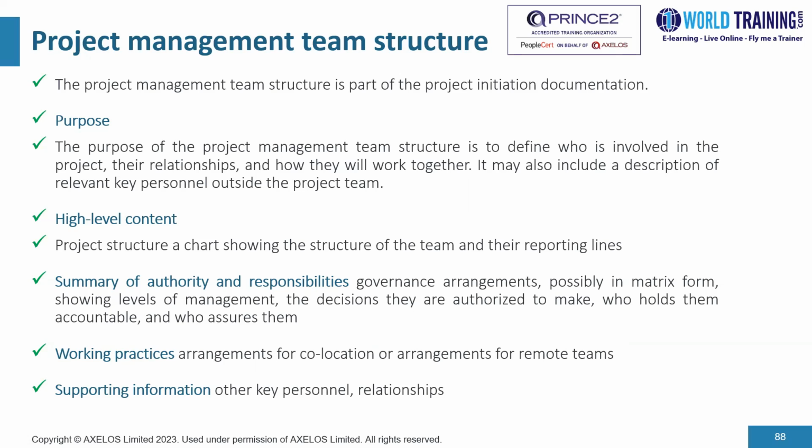So some of the content areas in this particular document would be the project structure, showing the various people involved and the reporting lines. It would include a summary of authorities and responsibilities, governance arrangements, possibly in matrix form, showing levels of management, the decisions that they are authorized to make, who holds them accountable, and who assures them, etc.